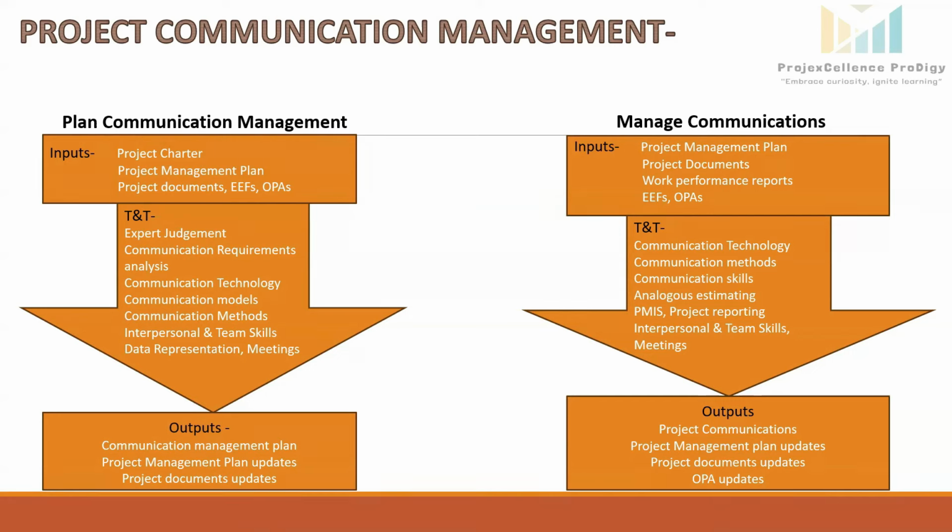For example, the engineering team needs detailed design drawing weekly. The procurement team needs delivery status report. The local government needs environmental compliance updates. Communication technology means selecting the right tools based on urgency, availability, and ease of use.